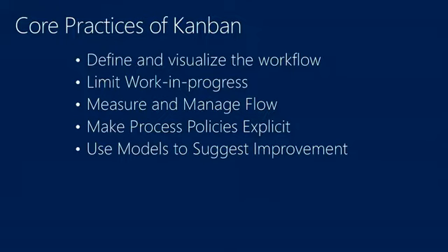So instead of having a product backlog and every 2 weeks taking a number of items out of the product backlog, you're doing it constantly. You're doing it literally maybe every day. And you get through a cadence. At the end of the cadence, you can do a release. Maybe after 2 or 3 weeks, you'll start doing a release on a regular basis.